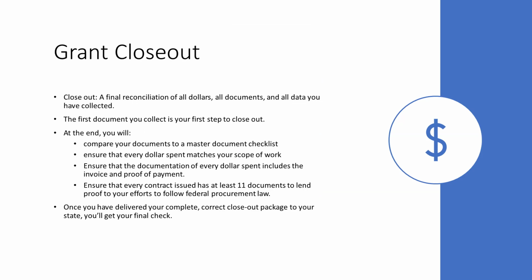As the process wraps up, you'll work to close out your grant. This is a final reconciliation of all dollars, all documents, and all data you have collected. In Tempest Gems, we say the first document you collect is the first step to close out. That's a shameless plug, but it should be true without Tempest Gems. The first document you collect, scan, and put into a binder is your first real step towards closeout.